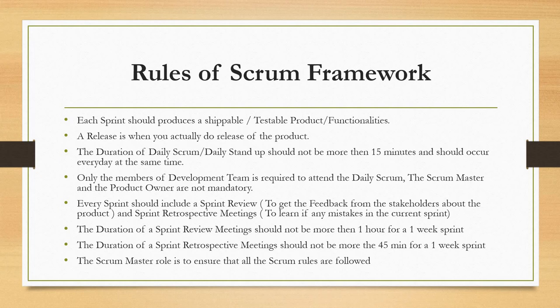Next, every sprint should include a sprint review session and a sprint retrospective meeting. Sprint review sessions are to get feedback from all the stakeholders regarding the developed product. And sprint retrospective meetings are to learn about any mistakes in the current sprint.